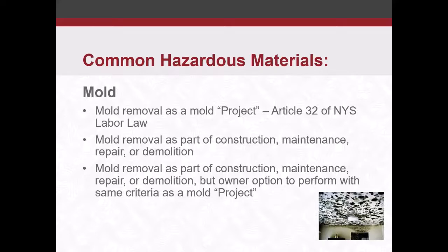it doesn't apply if you're doing removal as part of construction, maintenance, repair, or demolition. It's basically if you're going in to do just mold remediation, that's the sole intent, then this law kicks into gear. But if you are doing it as part of a renovation project, it doesn't really apply. With that said, an owner may still want to go through the whole process just to make sure everything is covered appropriately. So they may still, at their option, follow the requirements to have it assessed by a licensed individual, have it remediated by licensed individuals, and have a mold remediation plan in place to do that work.